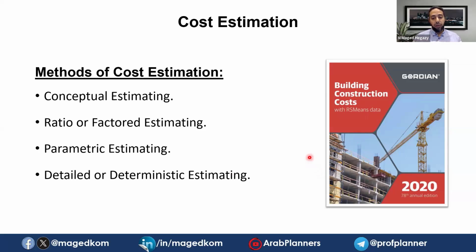And after all of this standardization around the world, even from RSMeans or from others also producing similar references for productivities, you need to have historical records in your company, from project to project, of what the productivity was, because these are your resources, your labor and the equipment operated by your resources as well.